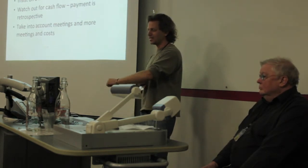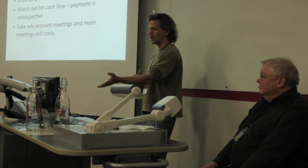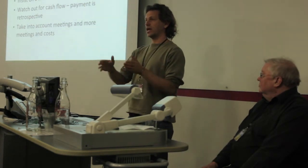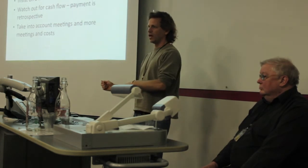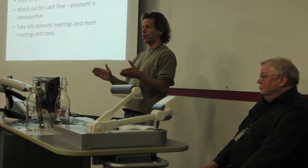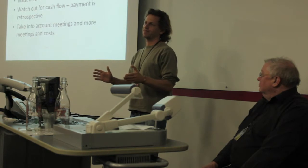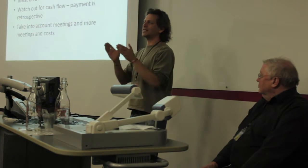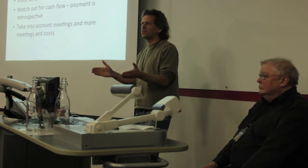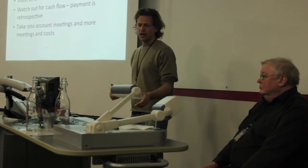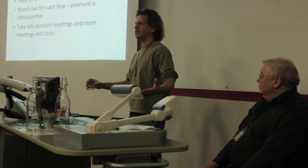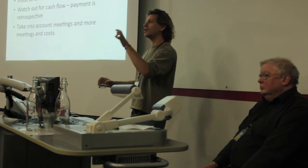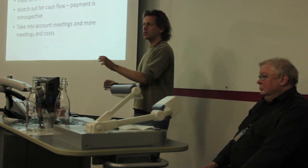Watch out for cash flow. You get an upfront payment in some schemes, then you get paid retrospectively. If you don't have a cash store, you will have problems. And they always keep 15% until the project is finished. So in the case where the total EU project contribution is 300,000, that's a lot of money you've already spent before you get it at the end. Watch out for that.